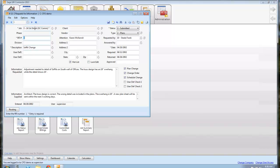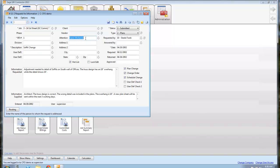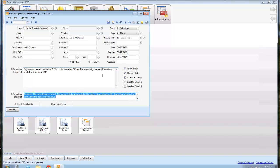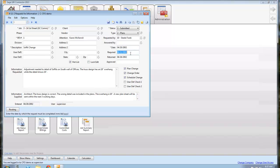RFIs: what job, what RFI number is it, what is it for, who do I send it to—is it going to a client or is it going to the vendor, what was my question, what response came back. And then when I print it out, I have a couple checkboxes over here: does it require a plan change, a change order, and a schedule change? If it does, those boxes will print on the actual RFI. Date required, the date returned, the date it was approved, who requested. So you follow a lot of information, you get the idea here.